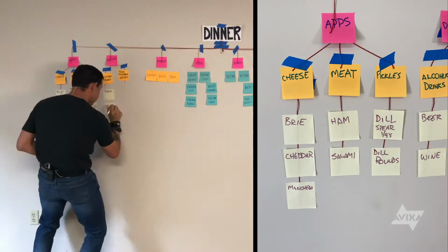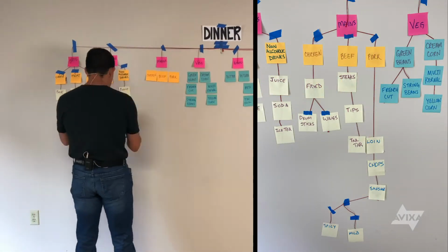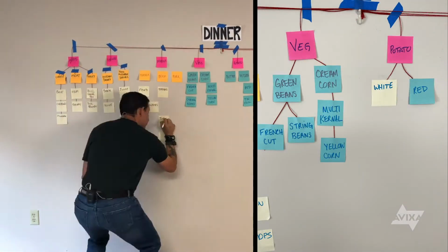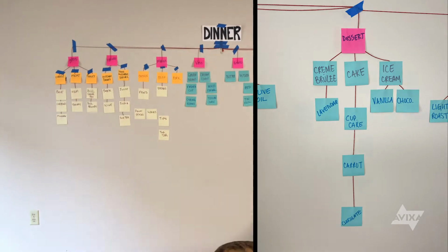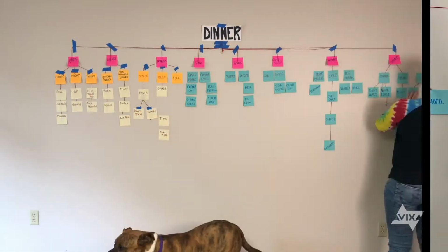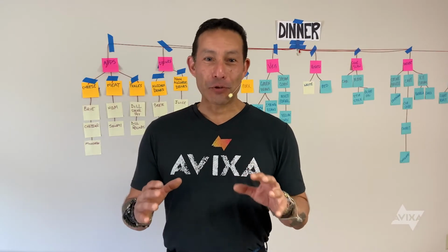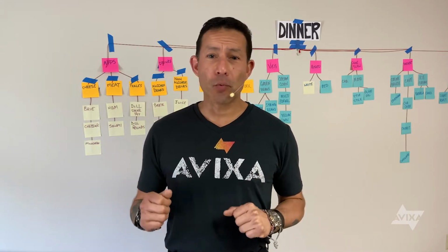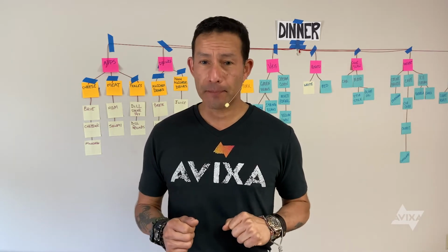Once I have a completed work breakdown structure with all my tasks broken down, I can use my logic network diagram to figure out how to properly sequence those tasks, what needs to come before what, and how long it will take. Logic network diagrams can be used when negotiating with your client regarding what other tasks need to be done before you can begin your task.